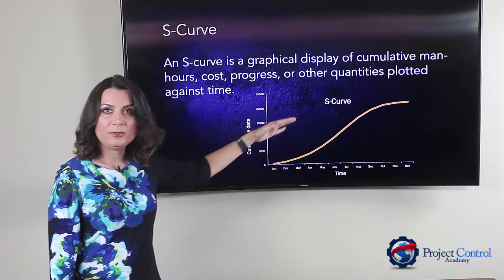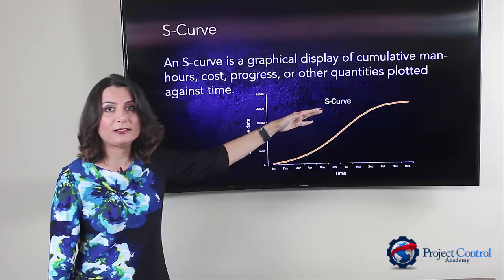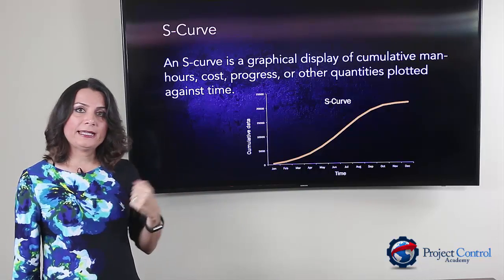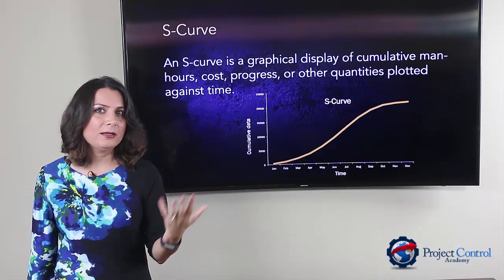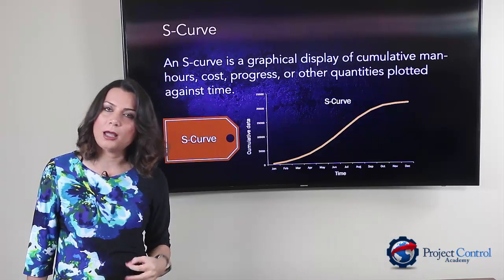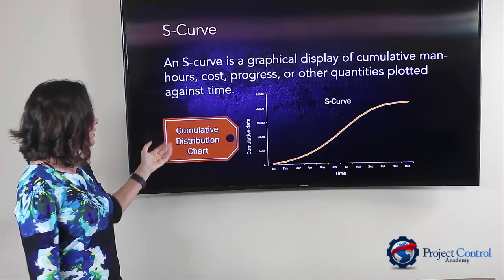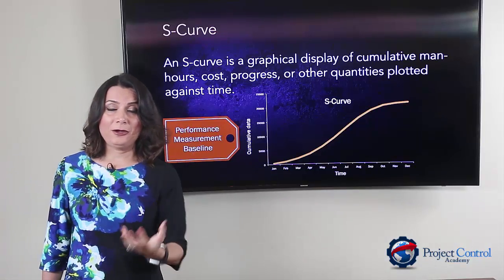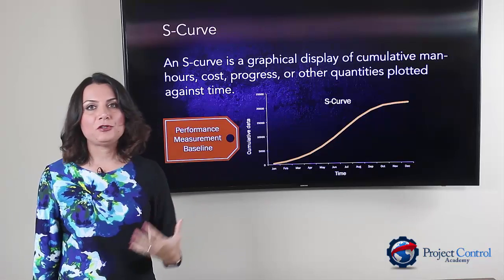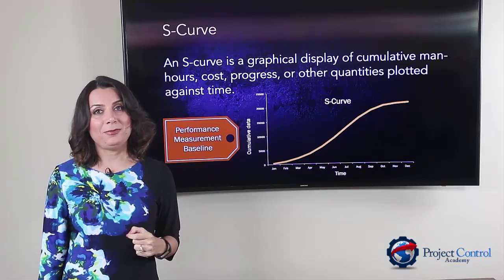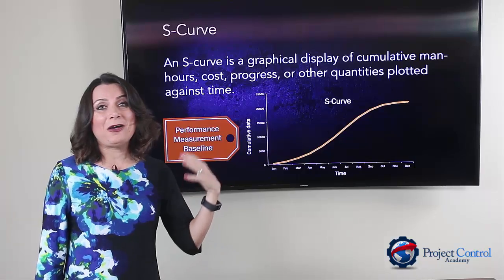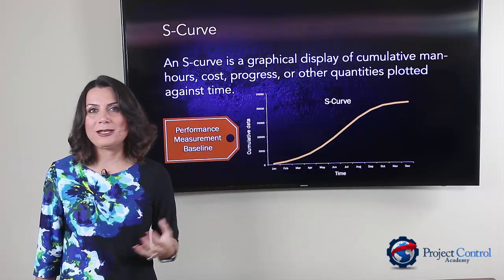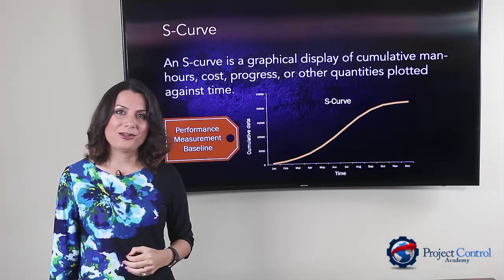Don't forget S-curve is a cumulative plot — cumulative data that you plot against time. You may find S-curve referred to by other names: S-plot, cumulative distribution chart, velocity diagram, or in earned value management it's called the performance measurement baseline, or PMB. Don't be surprised if you've heard it called other things — the bottom line is you are drawing an S-curve in projects.